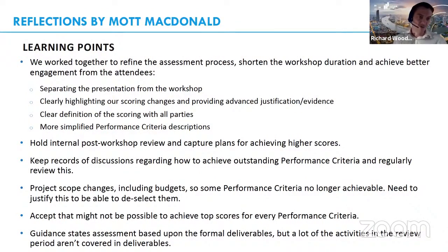So for subsequent workshops, we've done the presentation perhaps typically a week before. So our progress presentation before the workshop, to both shorten the workshop on the day so we can focus on the scoring of the performance criteria, and also to give BMA time to reflect on what we presented and to reflect on our progress and to help them with their scoring.